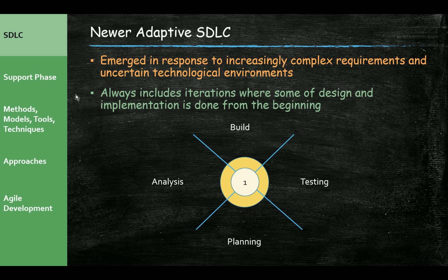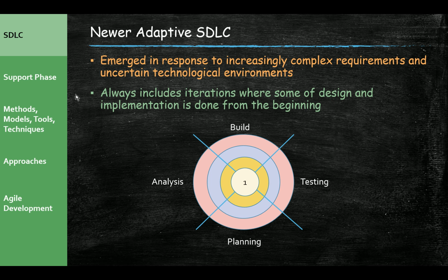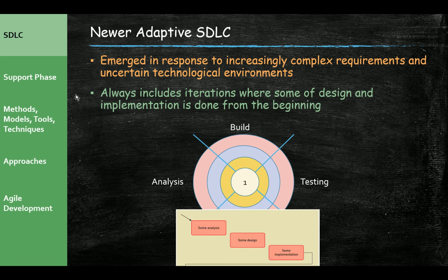So we do more planning, more analysis, more building, more testing, and so forth and so on until we get to the final phase, which is where we're doing the most work, but we're finally producing a workable system in that final phase. So you kind of spiral around, and it's really hard to do spirals in PowerPoint. Otherwise, I would show you a nice spiral on there. But if you can imagine each one of those spiraling, so from 1, we transition into 2, then 3, then 4, and so forth. And in a typical project, you could do 6 to 12 iterations around through this spiraling.